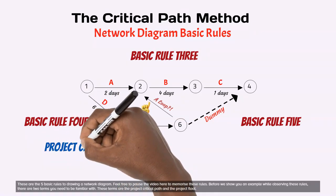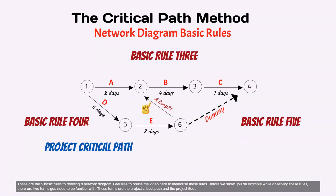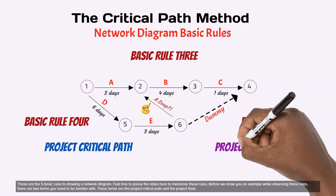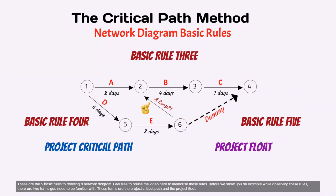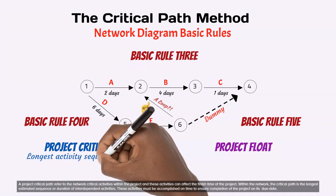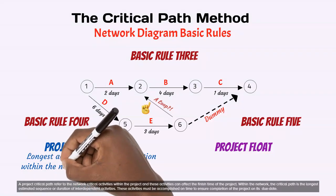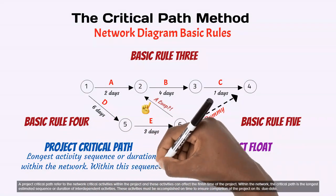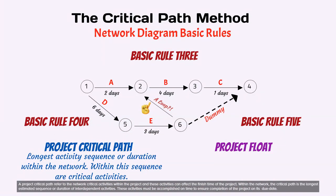Before we show you an example while observing these rules, there are two terms you need to be familiar with. These terms are the project critical path and the project float. A project critical path refers to the network critical activities within the project and these activities can affect the finish time of the project. Within the network, the critical path is the longest estimated sequence or duration of interdependent activities. These activities must be accomplished on time to ensure completion of the project on its due date.